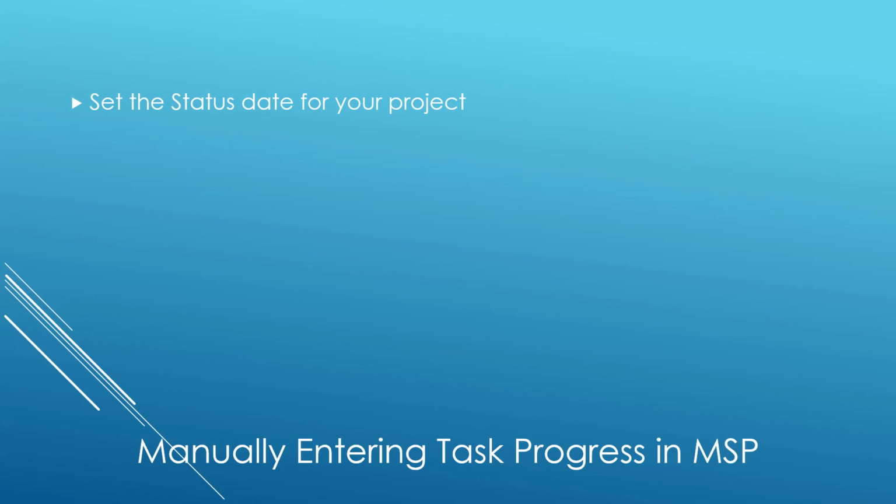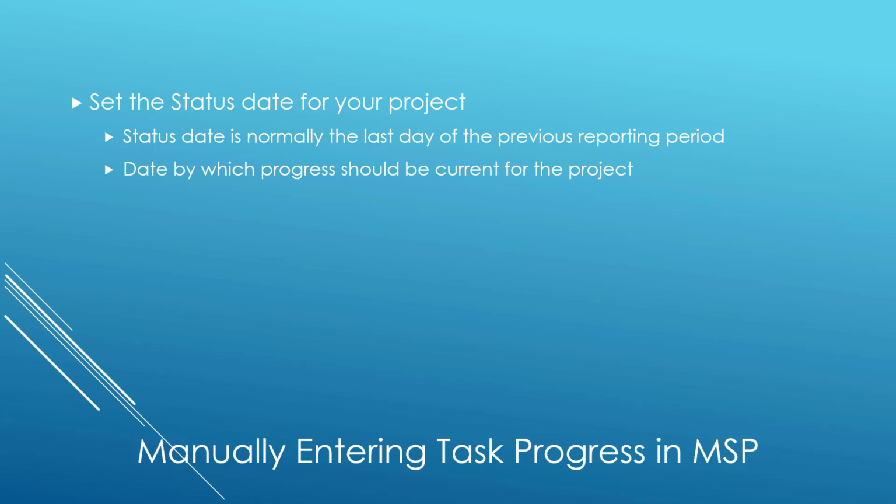your project. If you're not familiar with the concept of status date, the status date of your project is normally set as the last day of the previous reporting period. It is the date by which all progress in your project should be current.